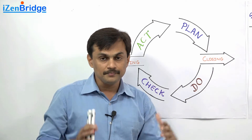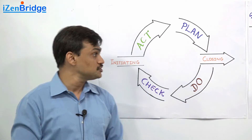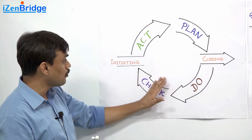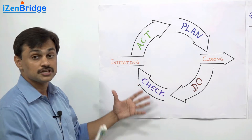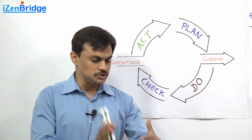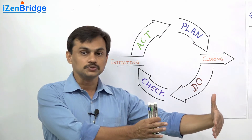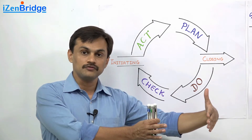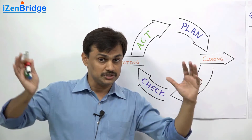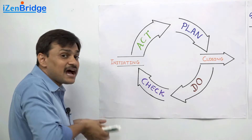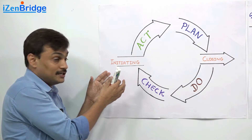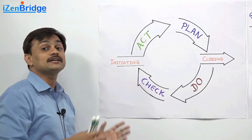So in the Project Management Body of Knowledge, we have Planning, Executing, and Monitoring and Controlling process groups, and these three give you a fair idea about planning, doing, and responding as you learn from your doing. Now, in order to start this cycle of planning and doing, you also need to do some start-up activities, and these start-up processes are grouped under the Initiating process group.